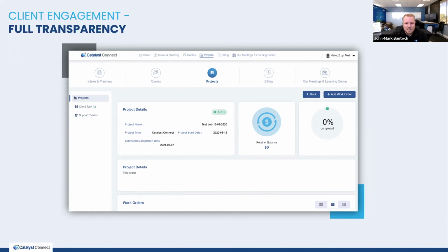Not that we had that many to begin with, but we maybe only get five people a month questioning an invoice, because everything's here in the portal for them. They know what we worked on. They've already approved the hours. If we need additional hours, we go through a scope of work change, so there are clear expectations of the implications of those changes. And if they need the detail of the invoice, it's already there for them live. That's really helped build a better relationship with clients through that transparency.